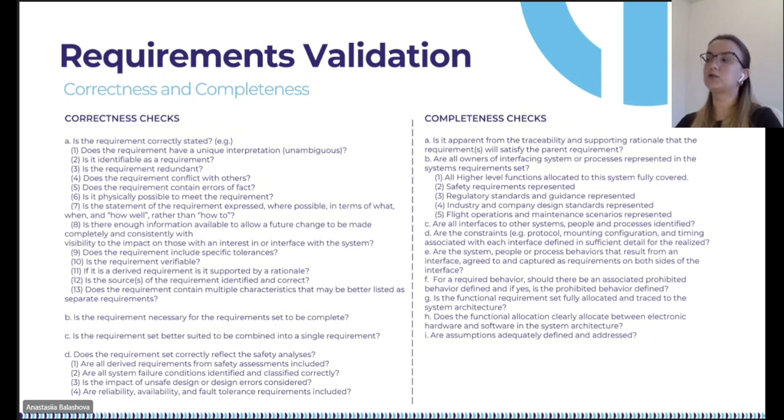Another way is to buy them. Some companies may provide you not only with necessary checklists, but also with plans and standard templates. I think that the advantages and disadvantages of both methods are obvious. I also think there is a good practice: at the end of the project or phase, after the lessons learned, you update the checklist to reuse it in the next project. Thus, the checklists are constantly updated and evolve, and when a new project is kicked off, you can use the updated checklist.